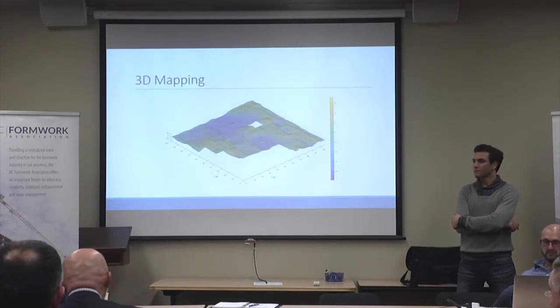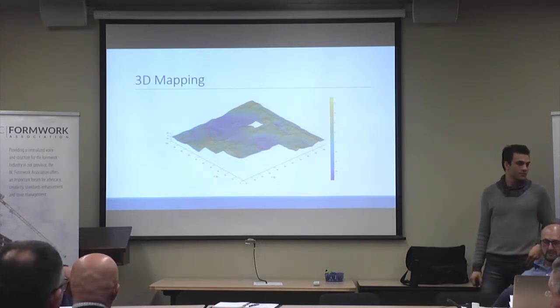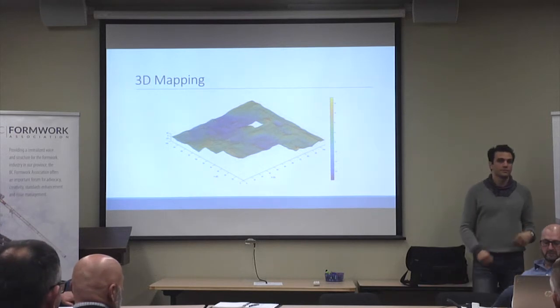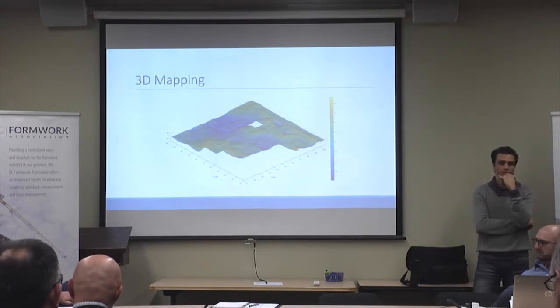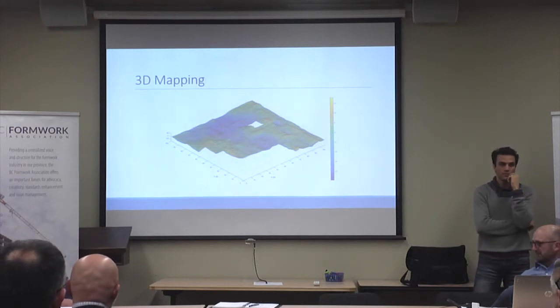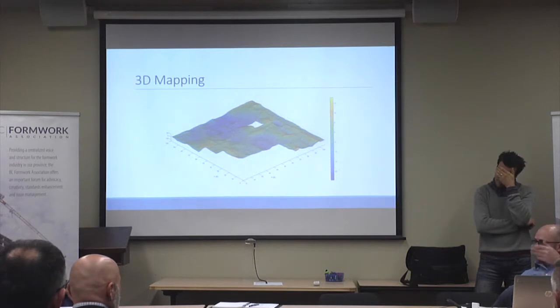If you can get us whatever the spec is. So that product should be recommended by the flooring. Well, I don't think we can say a product, we have to say a spec. We have to have a spec in our tender for their division as a separate line item, X amount of hours, days. Because we don't know what goes on, we're just fixing like a bunch of dummies.